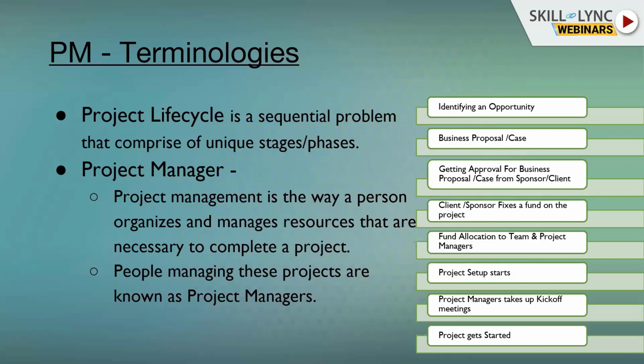After the project setup, project managers take up the kickoff meeting, in which he prescribes what is actually the deliverable, what is actually the product which we have to launch. So this comes in the kickoff meeting, and then the project gets started. So this is the sequence of activities in which the project lifecycle works.